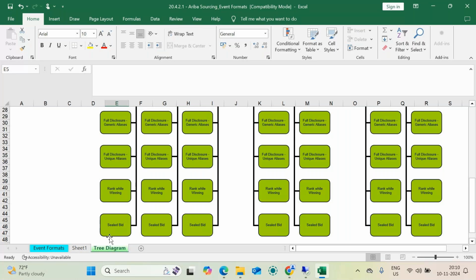And this is one important one, sealed bid. Sealed bid is important. If you see government bidding, in every country government bidding is happening. What government is doing is they will never disclose the supplier, they will never disclose the price, they will only disclose after every timing has been over. Then we have to do the technical analysis, the commercial things, and only then they will open the bids. So that is called sealed bid. We are going to discuss sealed bid and everything. So these are the important ones.